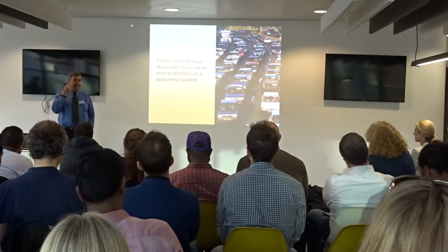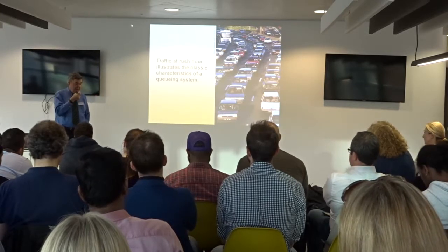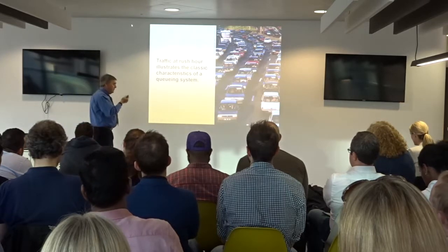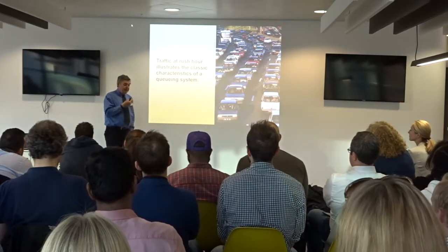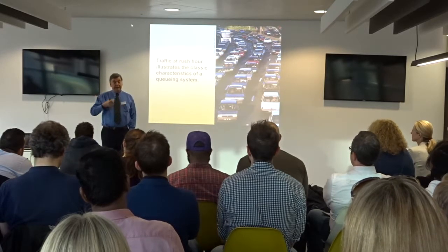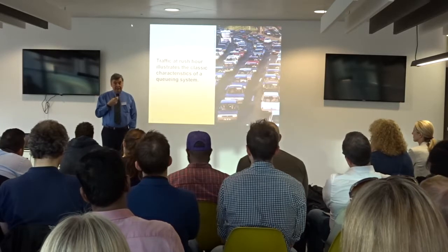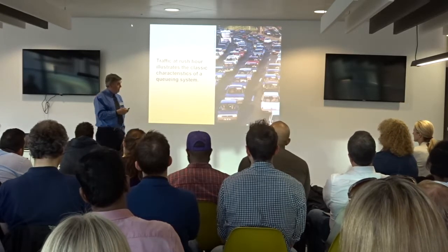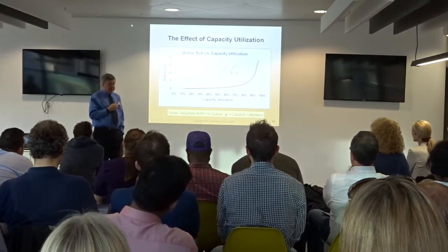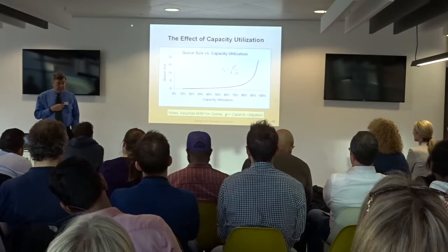The time in the queue, the changes in the cycle time, depend on the level of loading. And as you change the level of loading, the queue goes up non-linearly, and it depends non-linearly on the capacity utilization. And this is real queuing theory. This is an MM1 infinite queue. It's one of the types of queues you have.